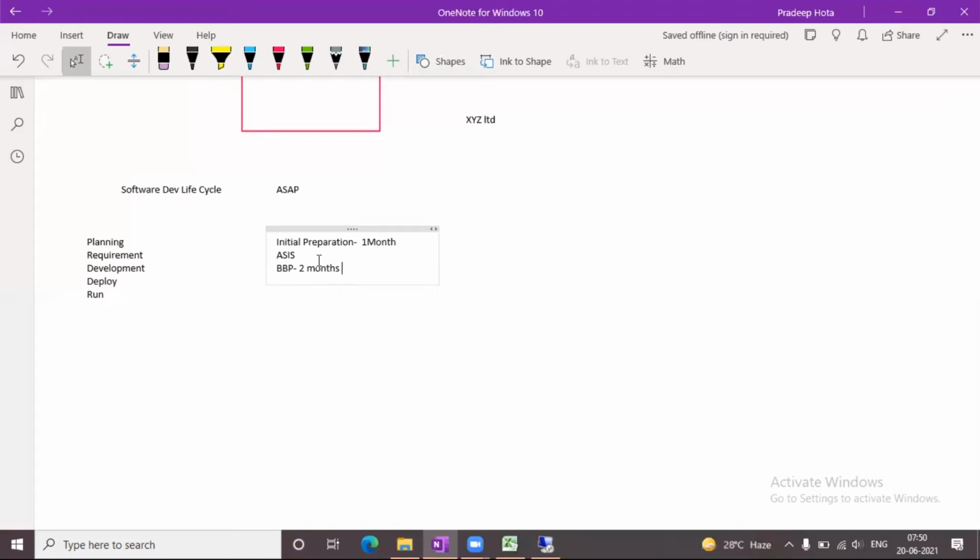What we are going to do is as per the scope document. Initially, the sales team must have explained the things properly, and on that basis the contract was signed, so that scope document was prepared. Now as a consulting team, I prepared this blueprint. There will not be multiple business blueprints. A consolidated BBP will be there, and all consultants participate within that, or maybe it is handled by the team lead. When the BBP is created, a draft copy will be shared with the business owners or process owners. They read it, understand it, and sign it.